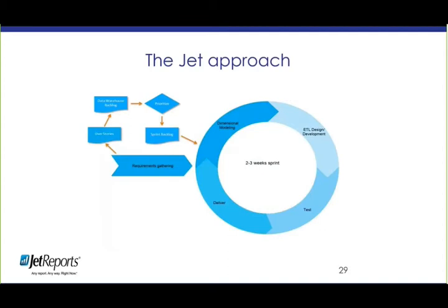So in the DWA world, the technology part happens much faster, right? And again, that changes the way BI projects get built. So this requirements gathering exercise sort of changes into something different. Essentially, we talk to end users, and we come up with a list of priorities, and we call these user stories. And we like to frame user stories by saying, okay, tell us, in my role, I need the following data presented in the following way for the following business reason. Right? That's a user story. So we go through, and that's easy for people to tell us because that's what they do all day. So we gather a big list of user stories. We call that the data warehouse backlog. And then we prioritize that list.